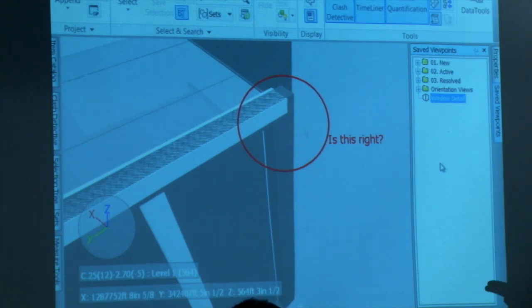So it doesn't take very long to say, okay, I'm painting, you know, 3 coats of latex interior paint. I know my price per square foot is X. You're just putting that X in there. That's pretty quick compared to figuring out how many square feet you have. So if you can use a model, it's not like there's an easy button, but it's almost an easy button.